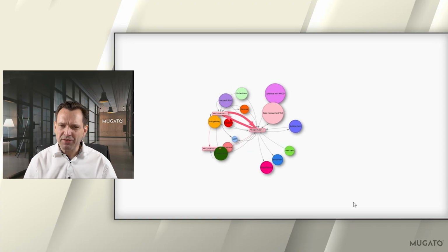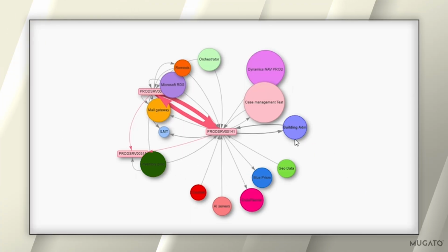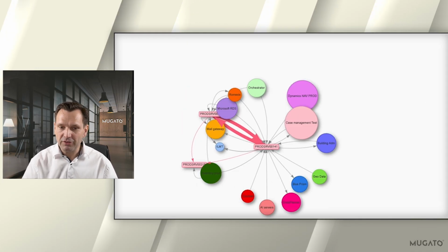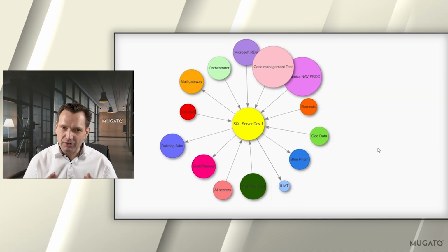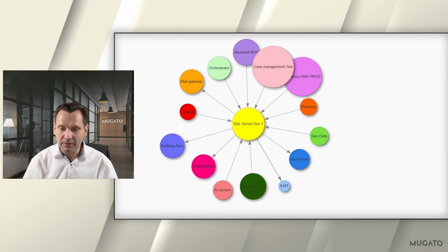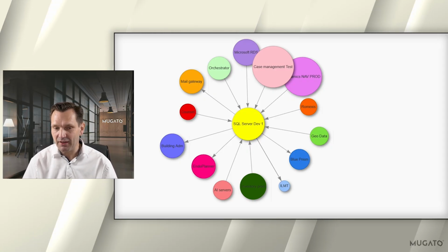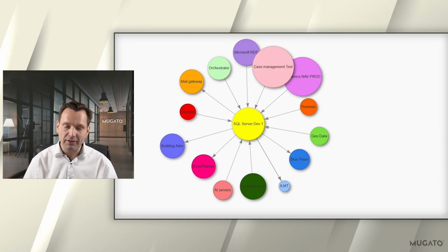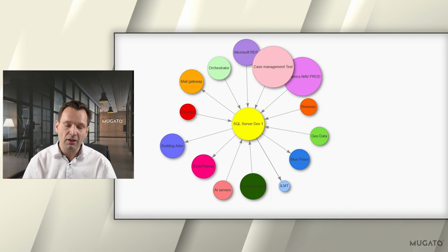If you look at the dependencies other applications have to that service, you will clearly see that a production service is consumed. So that being said, if your project is about to decommission this service, you will most likely impact production services, which is gonna delay your project timeline for sure, because that change caused some severity one incidents, and after you have brought back everything online, you still need to reevaluate your entire project plan because that might not be the only production application depending on your service.